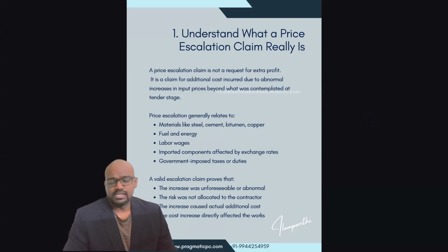People, the general audience, think that it is an attempt to make additional profit, which is not so. It is a claim for additional cost incurred due to abnormal increase in the input prices beyond what was considered at the time of tender stage. So price escalation generally relates to materials like steel, cement, bitumen, copper, fuel prices, energy, labor wages, imported components that are affected by exchange rates, and government imposed taxes or duties.